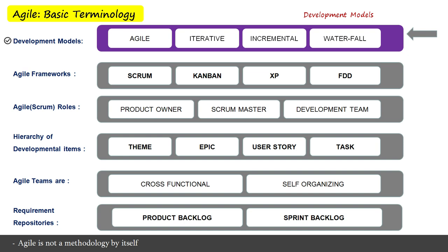These are a few development models like waterfall, incremental, iterative, agile and prototype, etc. Waterfall is one of the oldest SDLC models, widely followed in software development or even in any project development. The project execution is divided into separate phases in this model, and these development phases are executed in a sequential manner. The outcome of a phase is going to be the input to the subsequent phase.